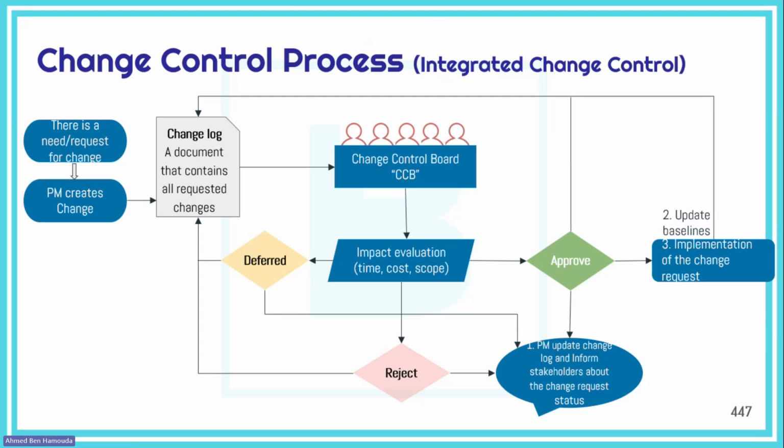Then, of course, the CCB, which is composed of a number of stakeholders, including the sponsor, sometimes other key stakeholders, can also be the PMO, sometimes somebody representing the customer, not always, but sometimes if it's a joint project between us and the customer. Definitely some people from senior management, decision makers, key stakeholders from the project or from the company. They will go through the evaluation of the change and the potential impact of it.